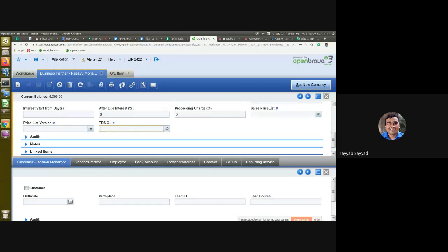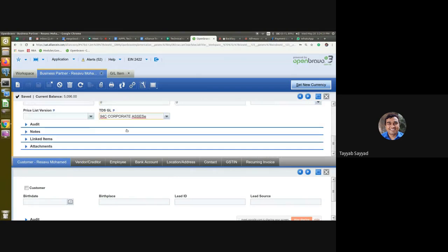You can see here the two TDS codes have been added, and based on this the account team will be debiting the TDS to the vendor account. It could be 94C, 94J based on his PAN or whatever criteria they are following. As soon as you link it, we can take the TDS percentage and show it in the work order also, saying that this much percentage is expected to be deducted from your bill.